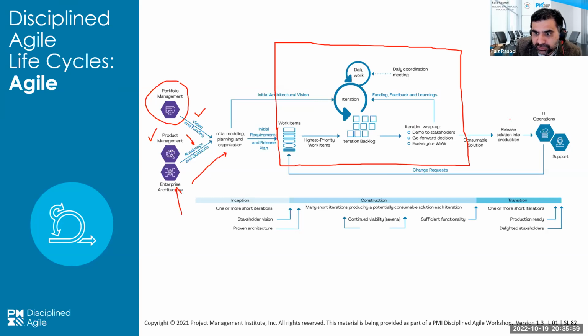On the other side, I'm not going in depth on this Scrum life cycle because we discussed it. When you prepare the product, the solution, the consumable solution, the next stage is to put it into production. And at what time should you be putting it? How about your support and operation teams? Are they ready? You produce something, maybe they are not ready to use it. What's the purpose of it? So production readiness on both ends, transition readiness on both ends, delivery teams and the operation teams.